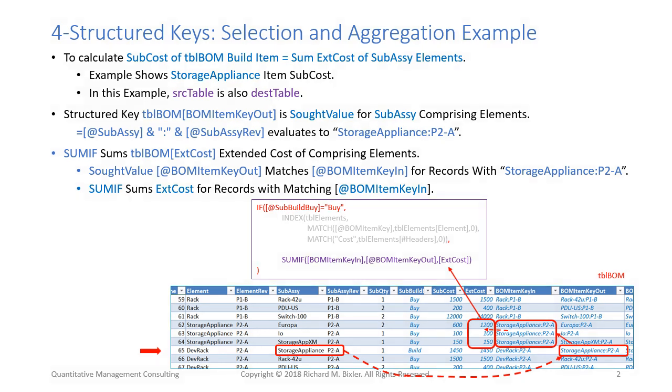Then the field XCost multiplies that subcost by the subquantity field of the record, and that's the total cost for that subassembly needed for 1 unit of the element. This provides a calculation structure in the BOM table that walks down the assembly tree structure for each element until the purchase cost of items needed to be built can be looked up and adding up all those costs.